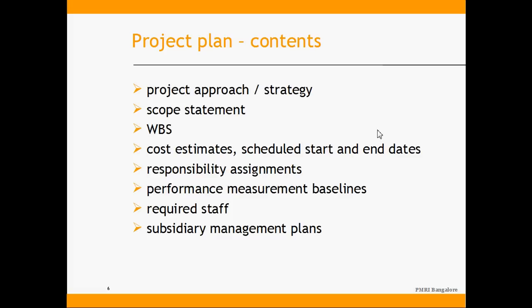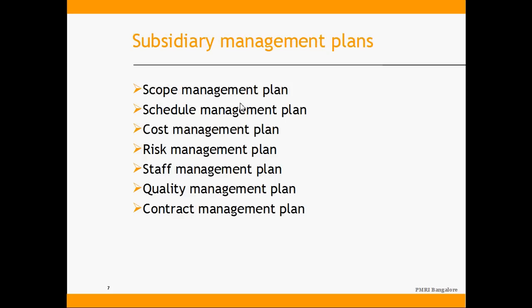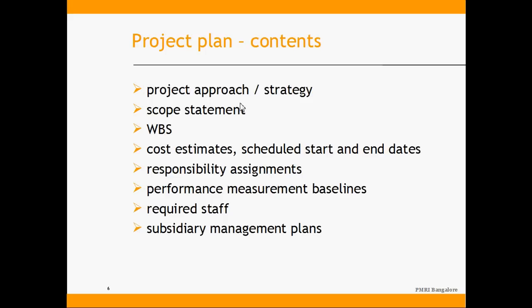The typical contents of a project management plan include: first, the project approach or strategy — whether to follow a tight waterfall model, an iterative model based on rapid prototyping, whether to outsource work, use reusable components, or develop reusable components during execution. Then a detailed scope statement is part of the plan, along with the WBS — once scope is defined, it gets decomposed into the work breakdown structure.